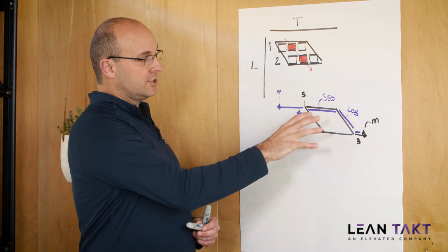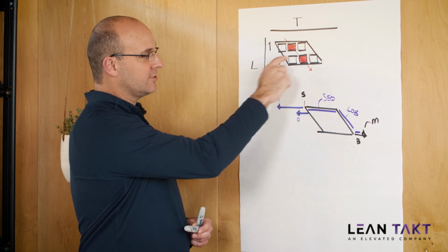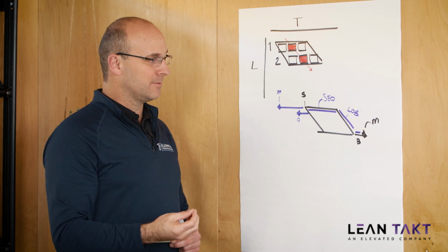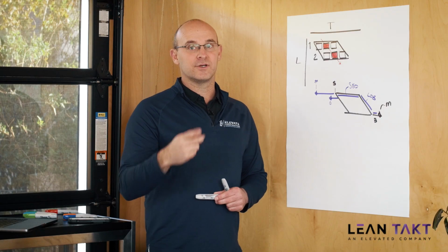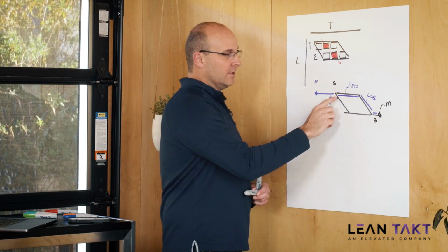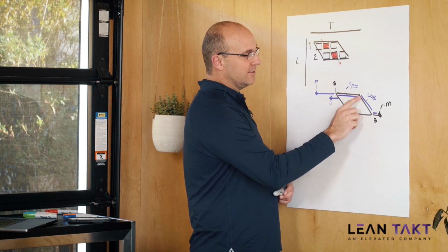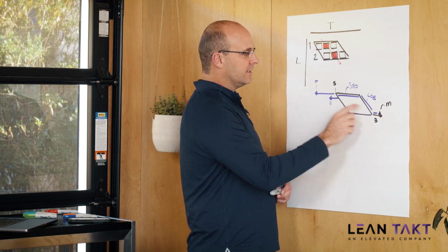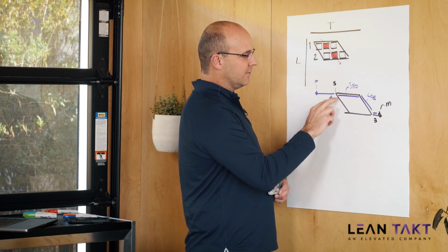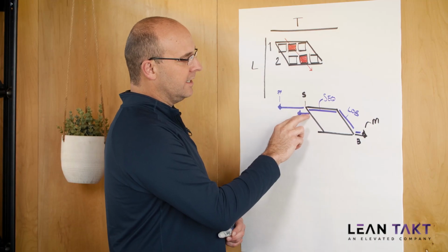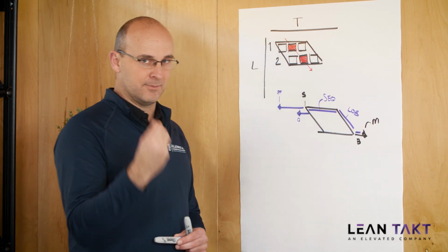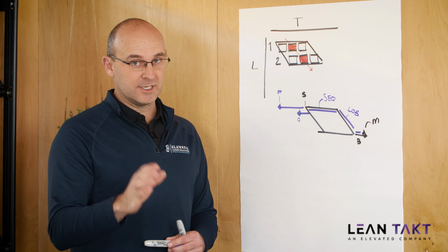So these shapes, these phases, this structure is very intentional and very consistent in the takt planning world. Every phase, whether it's structure or interiors or exterior or whatever the case may be, will have a shape like this, and it'll have a sequence, line of balance, a buffer, a milestone, and then, like what I said before, always a pull plan to vet the sequence and always quality pre-construction meetings to queue up that work. So this structure is like the base in takt planning. It's really, really quite genius.